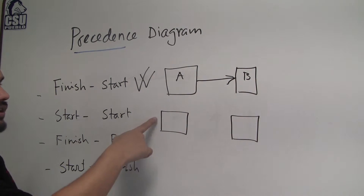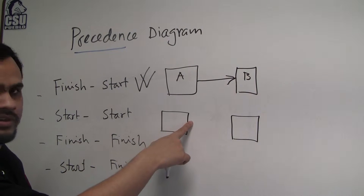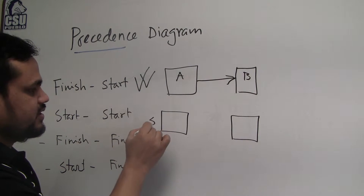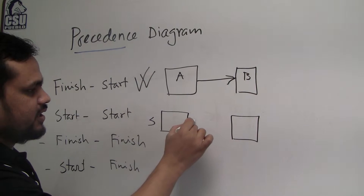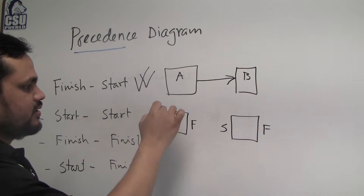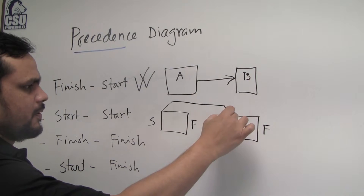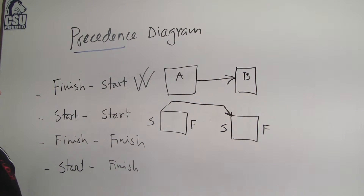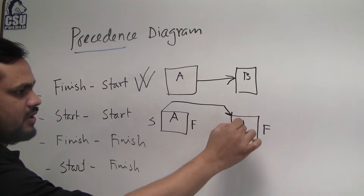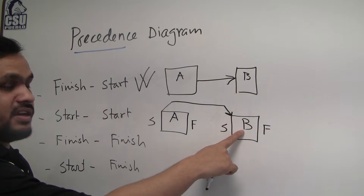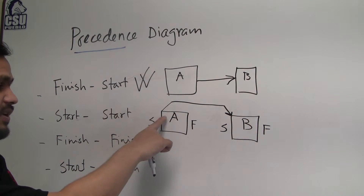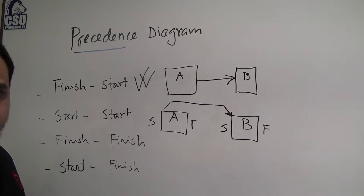Then there is start-to-start. This side is the start side, this side is the finish side. For start-to-start, activity A and activity B — B can start once A has started. If A does not start, B cannot start.